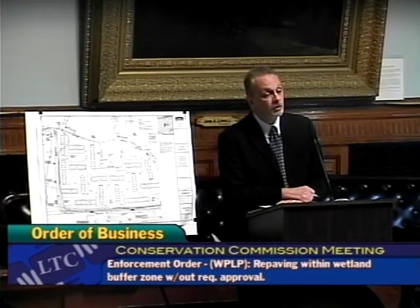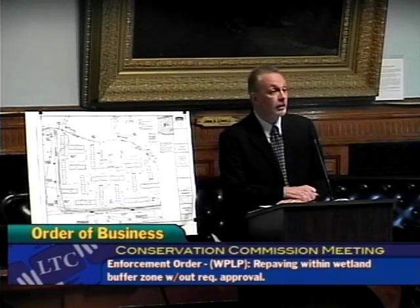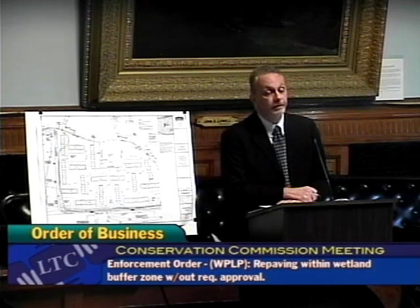What your best bet is to find a plan that has pre-existing topographies. Perhaps even, if you're lucky enough to find something with some spot grades along that back stretch, see if you're at or below those pre-existing topographies. Our intention is to get a surveyor out there and take some spot shots along the road, and compare that to those record drawings that we found, and we'll see if there's potentially other resources between original construction and today's date that could support that.